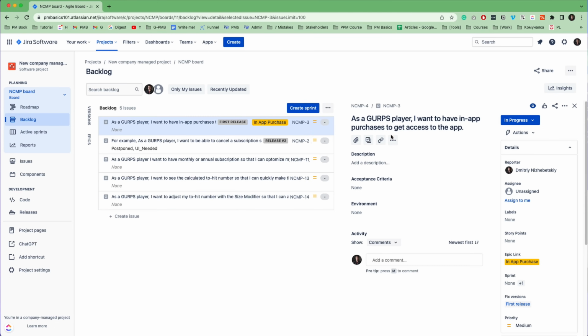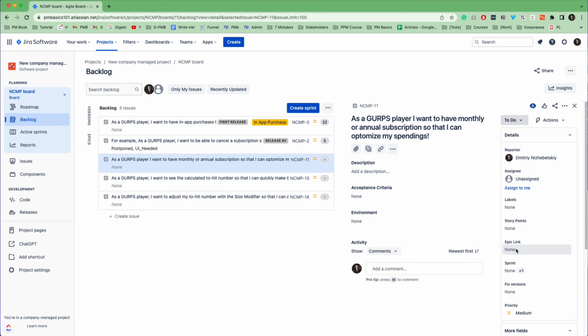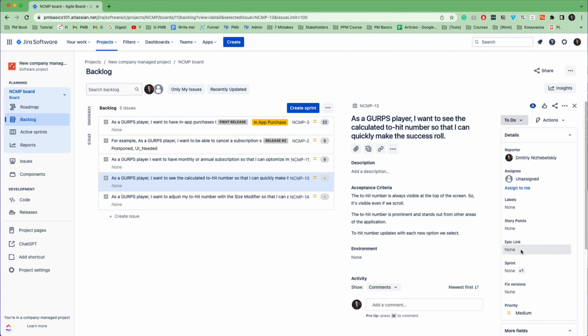The second approach, you do it all during sprint planning. So at the start of the sprint, you review the top priority user stories and estimate them. You may also decide that you can spend some time writing acceptance criteria during the first few days of the sprint, which will save you time during sprint planning.